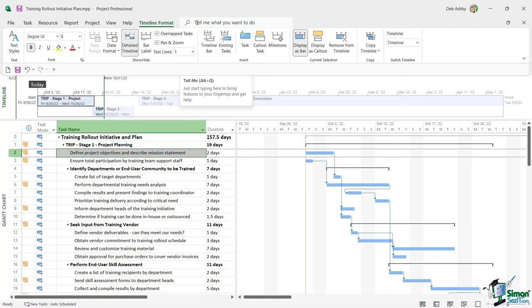From the Tables dropdown you can load up the Summary table for a high-level overview, or the Cost table to see fixed costs, total costs, baseline, and variance. There's also a 'More Tables' option at the bottom which opens a window showing all available tables. For example, the Work table shows work hours, baseline work hours, variance, and actuals. There's also a quick way to switch tables by right-clicking the small square in the top-left corner of the task grid.